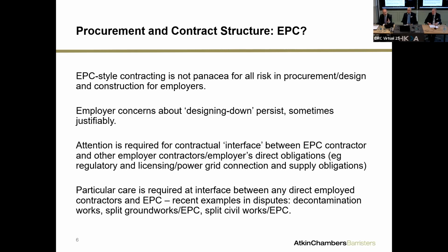But I think the problem with waste to energy procurements and projects that I've seen is, again, this issue about contractual interface. What you see in the EPC scenario in a WTE scenario is difficult unless you've thought it through in advance: how you deal with specifying what you want from the contractor and matching that with what you're obliged to provide to third parties, at the very least. That is the grid, for example. How are you going to achieve the outputs that you're required to achieve at the grid? And often, as part of this sort of hybrid approach to procurement and contracting, I've seen employers taking on certain aspects of the project themselves.